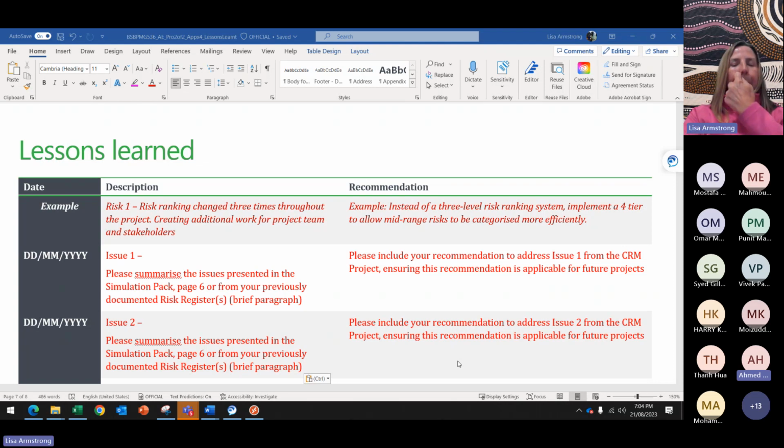Yes, very good. The second one is to give the supplier enough notice and make sure that we get at least a one week margin. Even if they are delayed, we still have one week to start the project, so at least we have all the hardware. Yeah, just some buffer in terms of time.